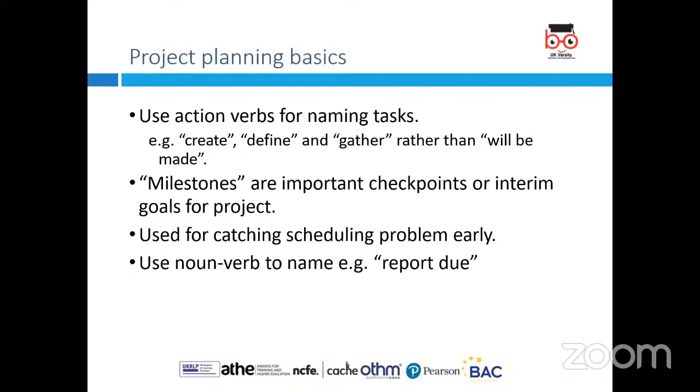Also, there is use of action verbs for naming tasks. When it comes to structuring them, we can assign them different names like create, define, gather, rather than will be done. Also, we need to take into consideration milestones, which are really important checkpoints or interim goals for our project.